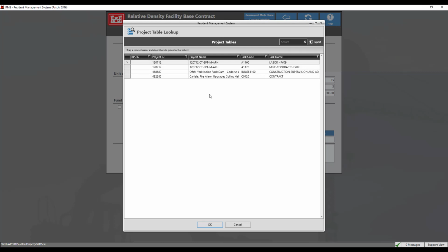Upon receiving official authorization to perform work on a real property construction project, the sponsoring entity will obtain and assign an RPUID from the real property accountable component for each real property asset that will result during the construction. A sponsoring entity is defined as the military department, DoD agency, or combatant command that sponsors the construction project. DoD agencies and combatant commands are not authorized to own real property. As such, these assets are under the jurisdiction and held in the inventory of the real property accountable component for the site where the asset is located.